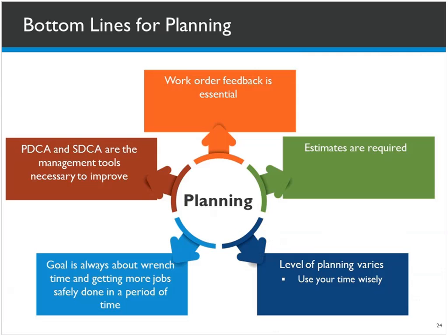Here's our last slide, and it's just to review real quickly. I believe, number one, starting in the green, that the estimates are needed. Time estimates are needed for these jobs for you to have a backlog, because a backlog is supposed to be judged in terms of the man hours, not just the number of work orders in the backlog.